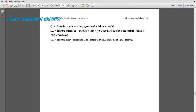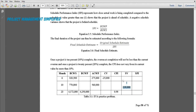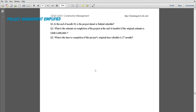At the end of month 10, is the project ahead or behind schedule? Since we are looking at the schedule, check the schedule variance or SPI. The schedule variance is already given as negative in the table. A negative schedule variance means the project is behind schedule, so we expect the SPI to be less than one.